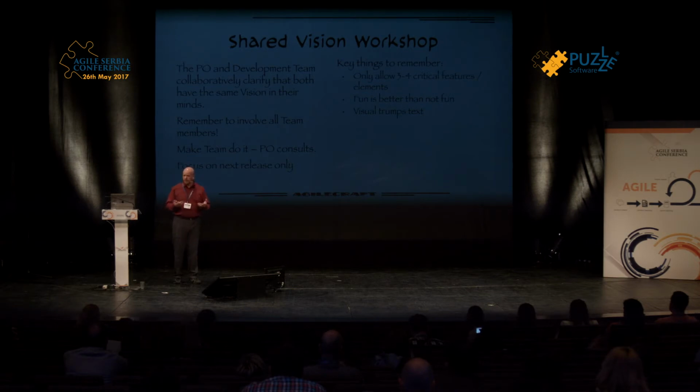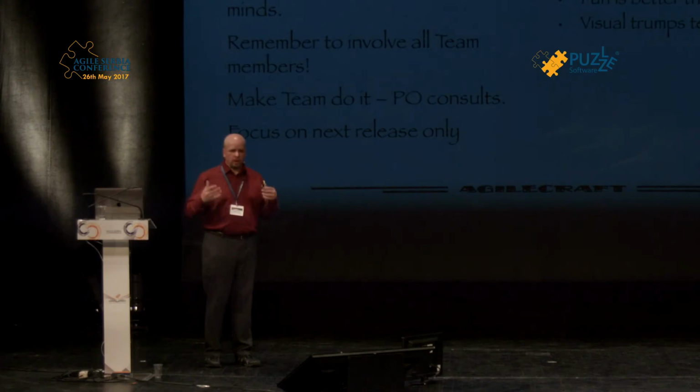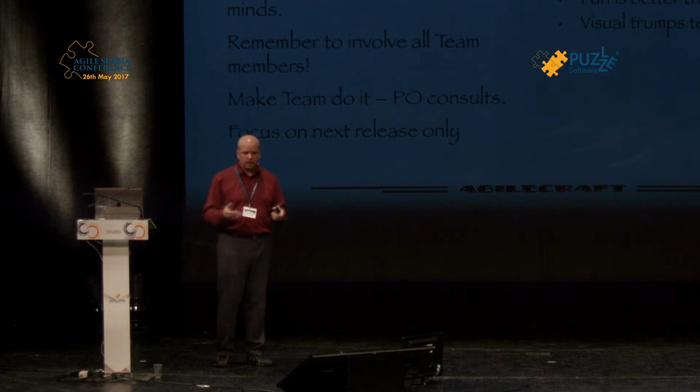But also the team knows some aspects of the problem that the product owner doesn't have, so the collaborative work is needed. There are different kinds of simple techniques you can use, or engage the people in a short workshop, maybe 60 minutes, 90 minutes, whatever it is, where the team, and this is a recommendation, have the team try to express the product owner's vision in their own language, in their own way, using some kind of a template or mechanism. The team should be there to consult and provide information if the team wants to ask about it, but the expression should be the team's.